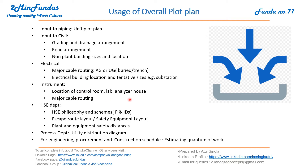For instrumentation: location of control room, lab, analyzer house, and major cable routing. The instrument team can easily locate all their control rooms and other buildings using the overall plot plan. For the HSE team, once they have the overall plot plan they can finalize their HSE philosophy and scheme, escape route layout, safety equipment layout, and plant and equipment safety distances.